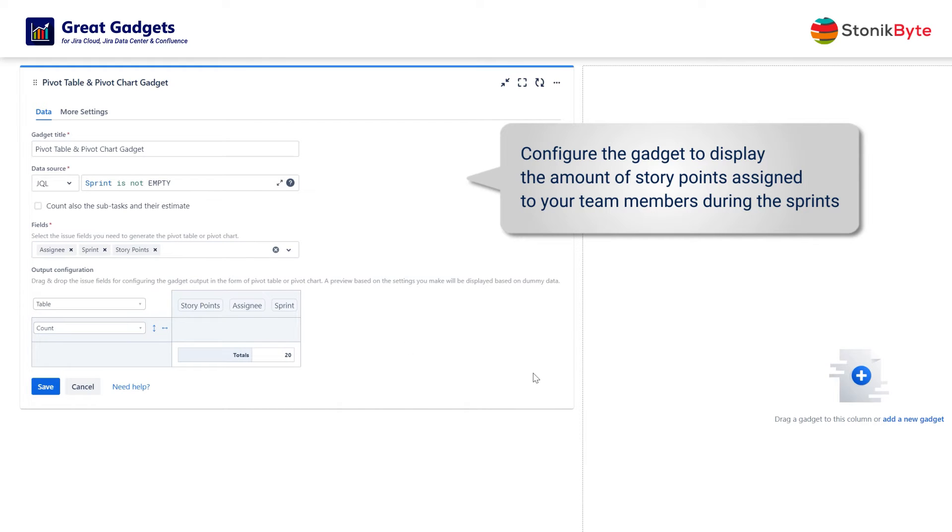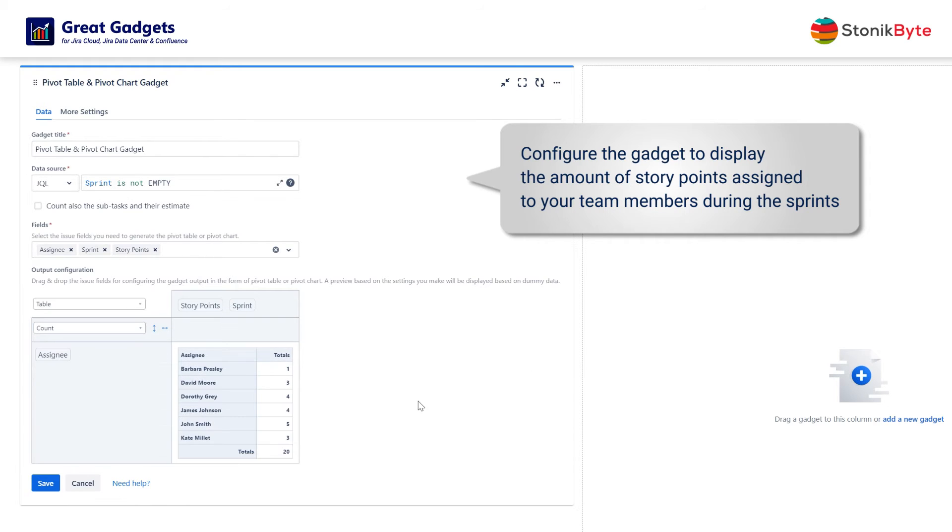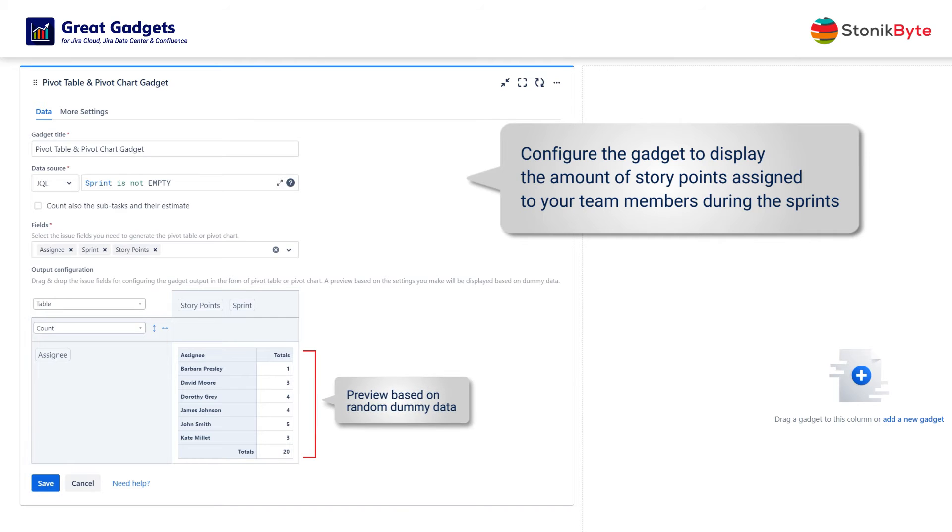Since we want the statistic to be by issue assignee, drag the assignee field into the rows area. It now displays the number of issues for each team member. Note that during configuration, the gadget will generate some random dummy data and display a preview based on it.